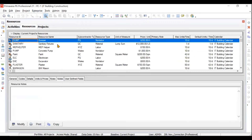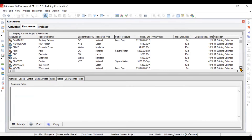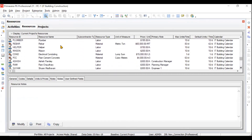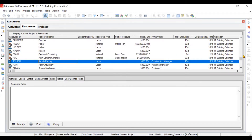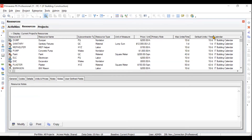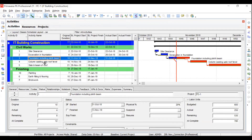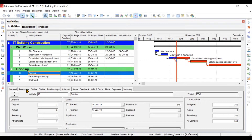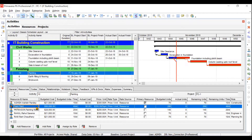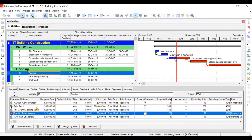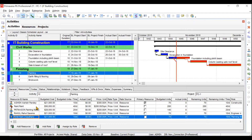First you will create your resources. For example, I have created helper, PCC electrical conduiting, a construction manager named Ashish Pandey, and so on. Then based on activities, you assign them — for example, for painting, in the resources tab of the detailed view, you can see Ashish Pandey as construction manager, paint as a material, painting mason, engineers, and a planning manager. This is how you assign resources to activities. Then we'll understand settings related to resources in their detailed view.